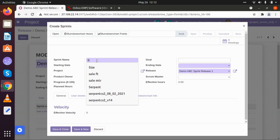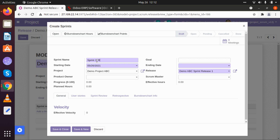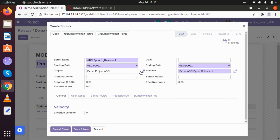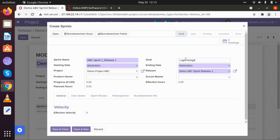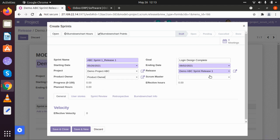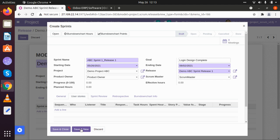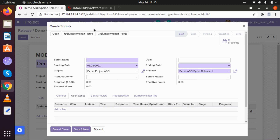So Sprint One Underscore Release One of ABC. I am going to keep its starting date from today and keep its ending date exactly a week after that — that will be the first sprint of one week, and what we will be doing is simply login design complete. The project is already created, the release is already selected. I am going to select the product owner and scrum master. If there are any user stories or sprint reviews in between, they can also be added here. I am going to create this particular sprint and save, then create a new one.